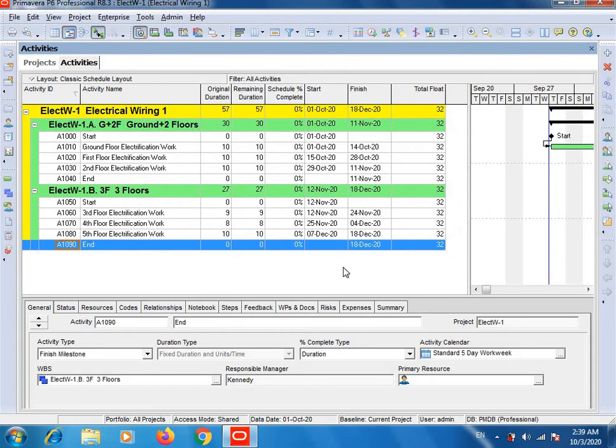So as I told you in my previous videos, whenever you decide the finish date of your project, you first exclude holidays, which is Saturdays and Sundays, and then when you reach your target date, after that you will add the excluded holidays, and then you will set the finish date of your project.